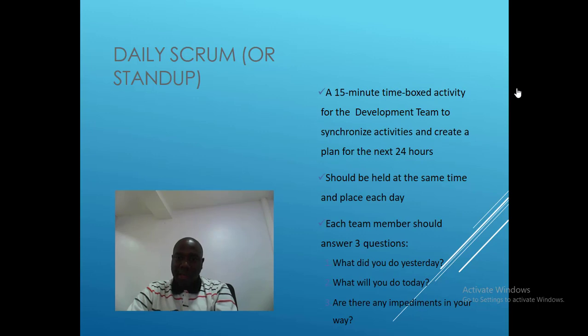It should be held at the same time and the same place each day. All right. Each team member should answer 3 questions. What did you do yesterday? What will you do today? Are there any impediments in your way? If these 3 things are clearly defined, it makes the work run smoothly.